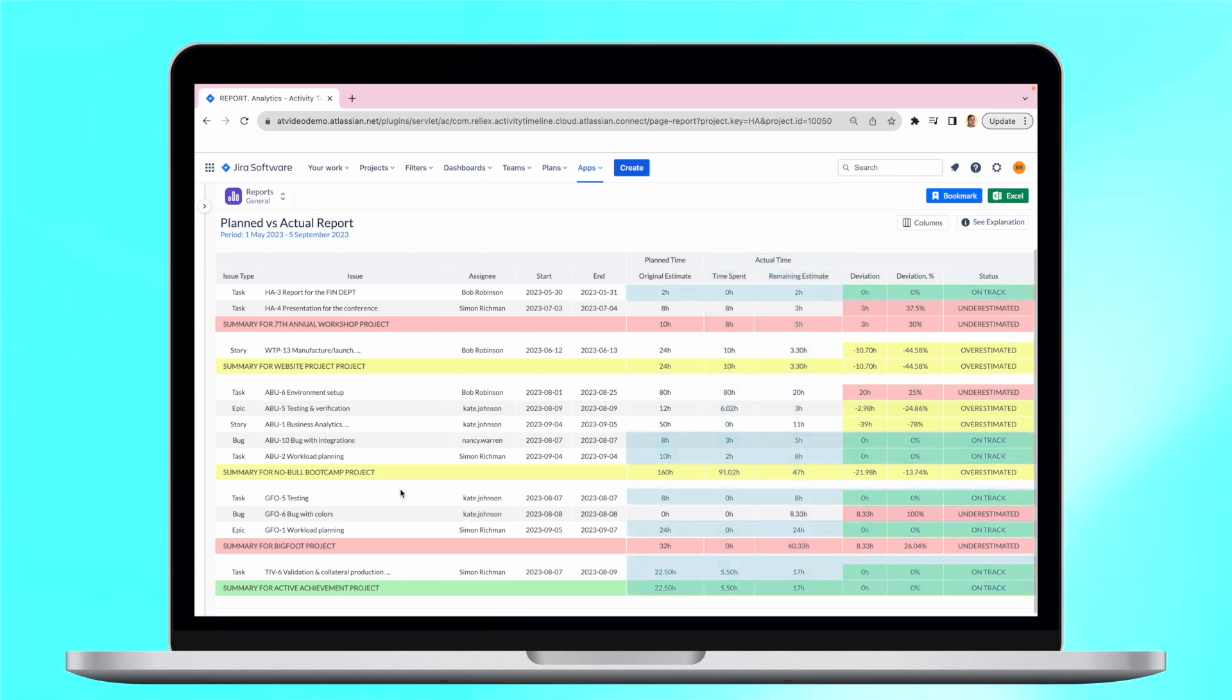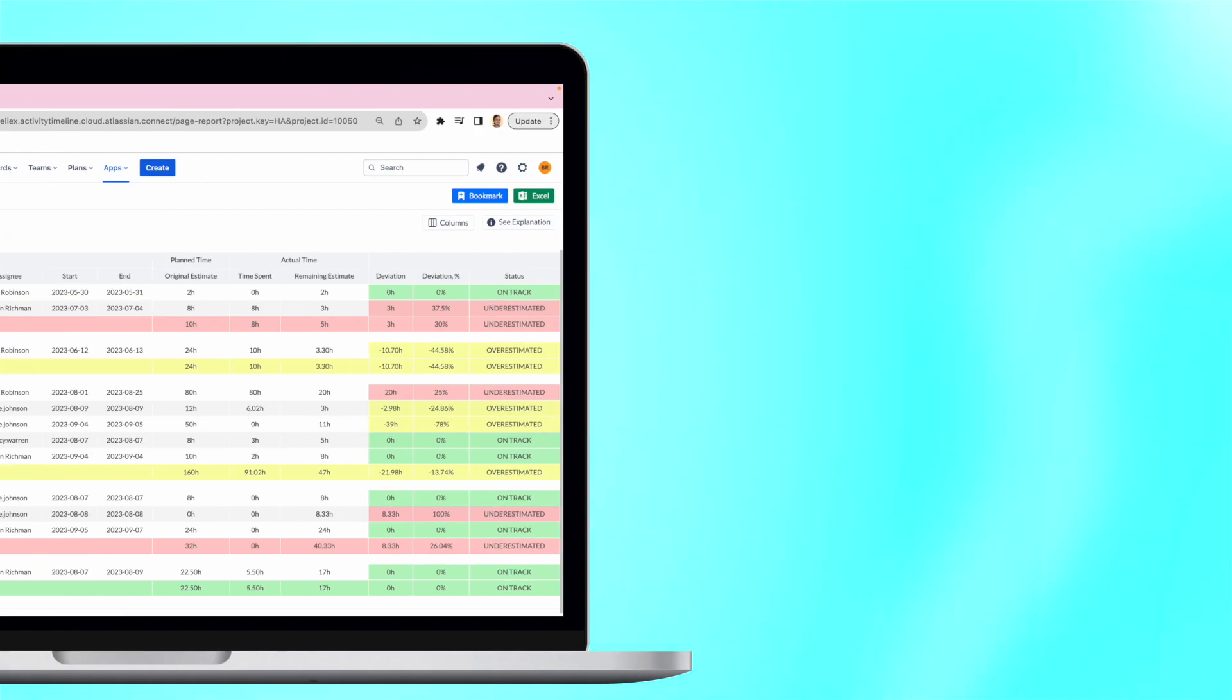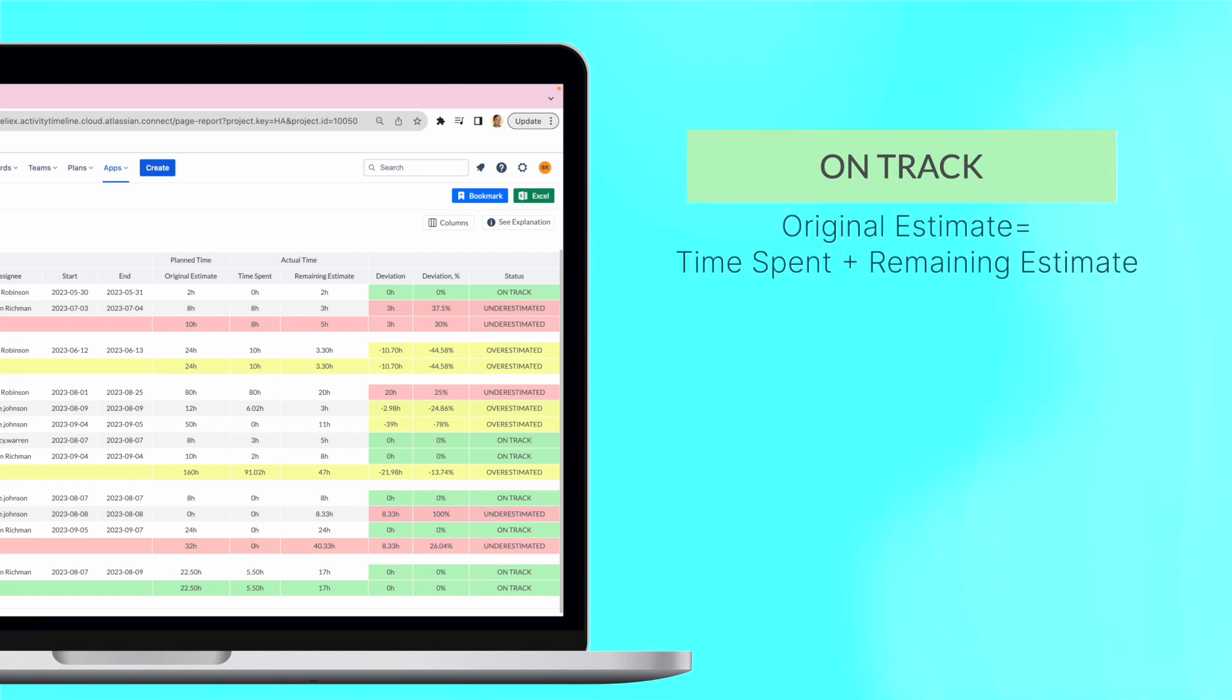Ideally, the time planned must equal the time spent plus the remaining estimate. In this case, we will see the green number and the status on track, which means that the estimation was correct.